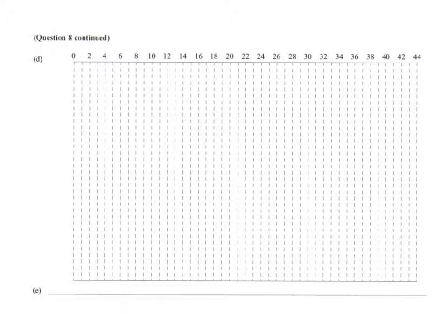A was 10 days, so I draw a box from 0 up to 10 and write A inside. I goes from 10 days to 19 days, so that's like this. But your diagram should be better than this. You should draw it as neatly as possible.